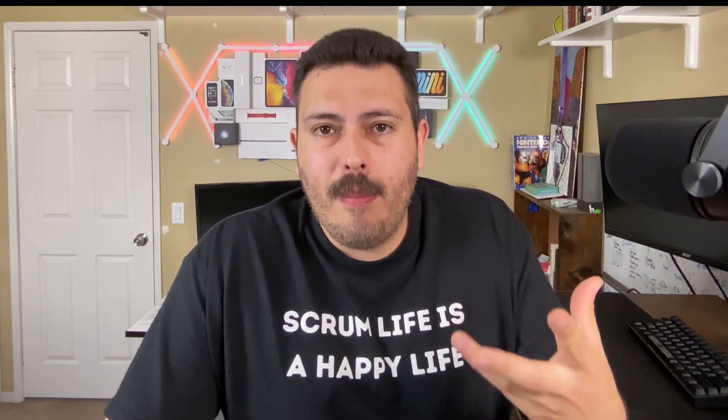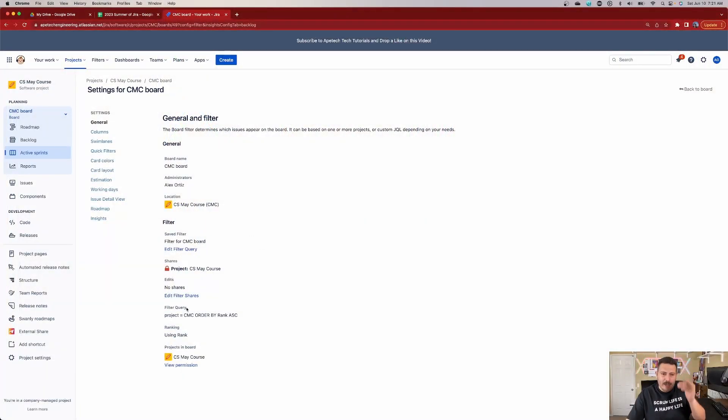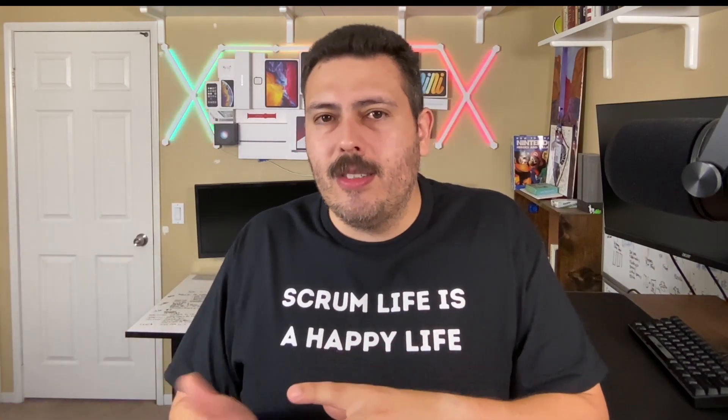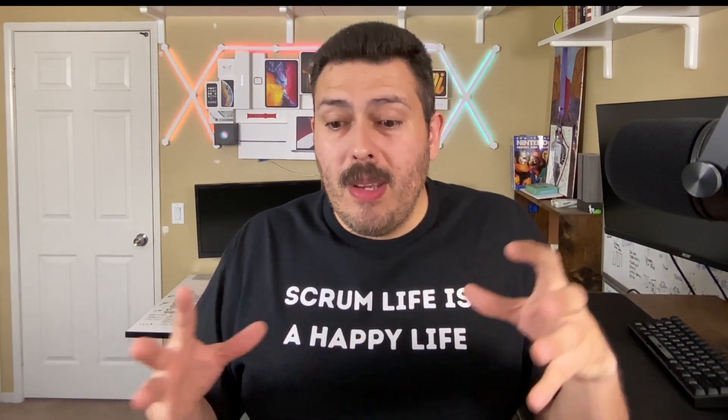The filter is probably the most commonly configured item you will do as a board administrator. Making sure your board has the correct filter and correct criteria is one of the more common changes I see at the board settings level. If you look at the filter query, you'll see it equals 'project equals my project, order by rank.' This is great when you have one board and one project — any issue that goes into that project will automatically show up on that board. But if you're a more advanced user, you can manipulate your filter, add criteria using JQL, filter by release, component, or even pull in two or three different projects by modifying your filter query.